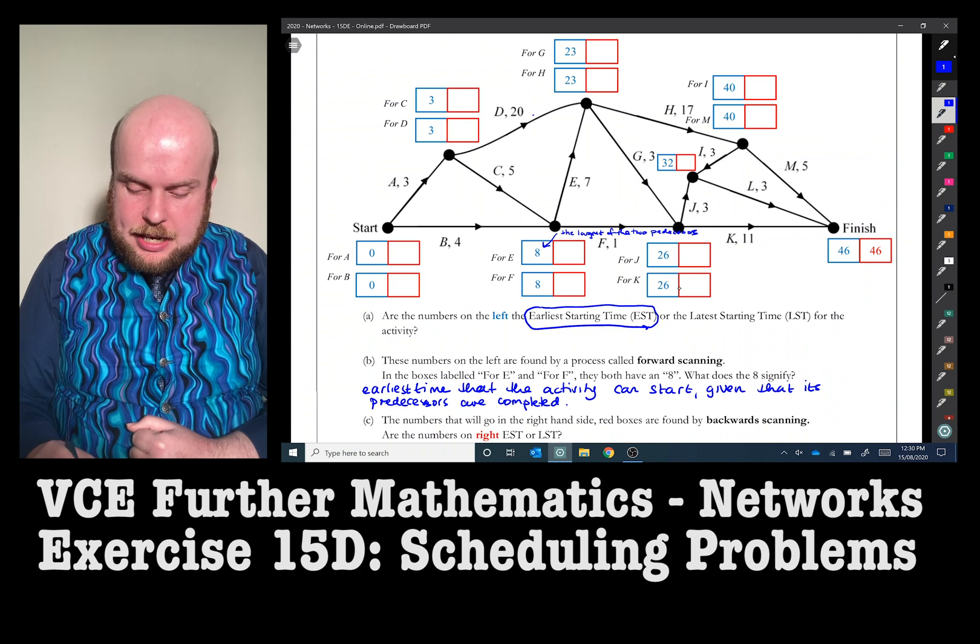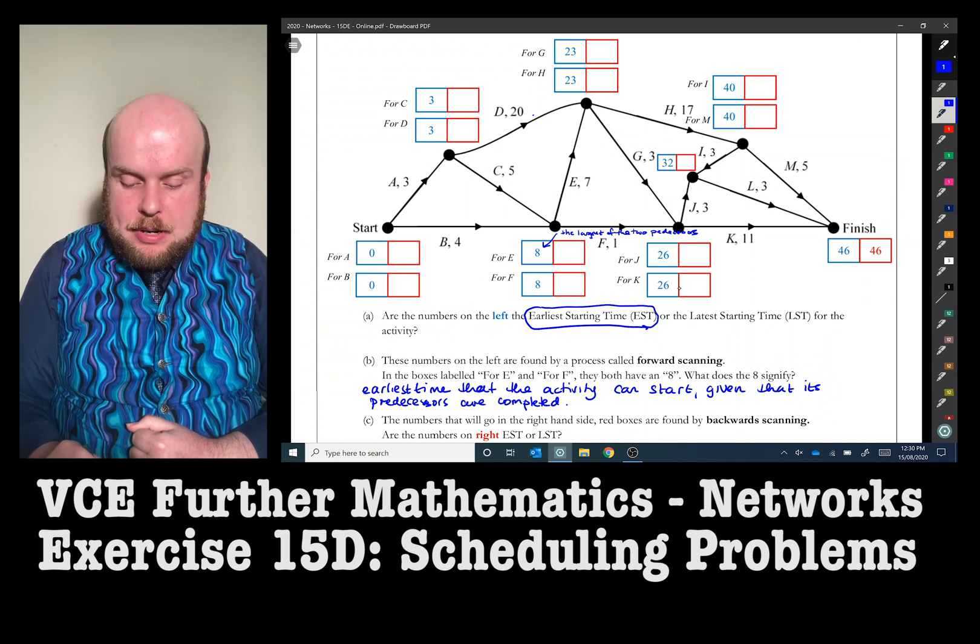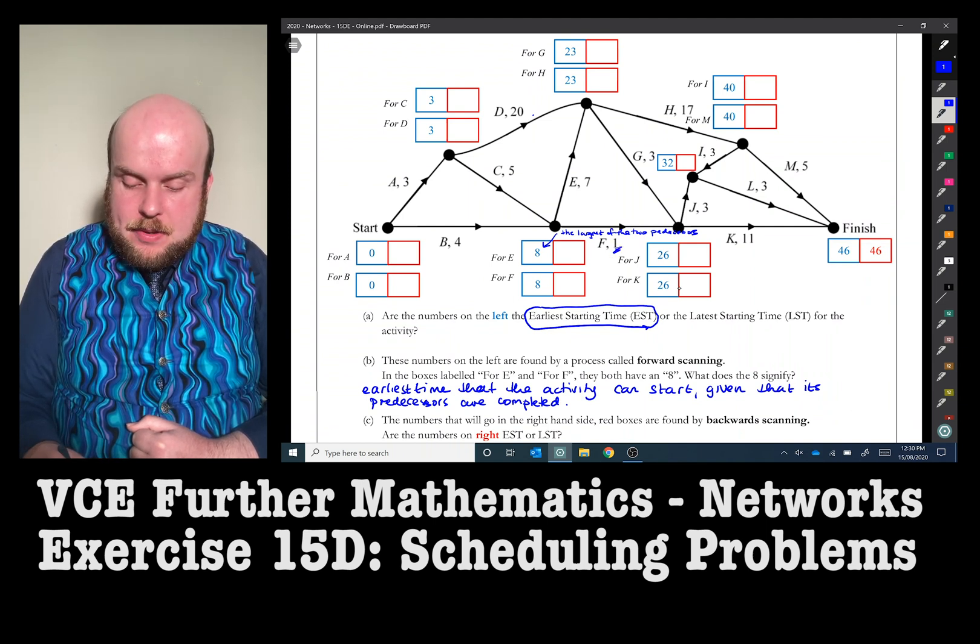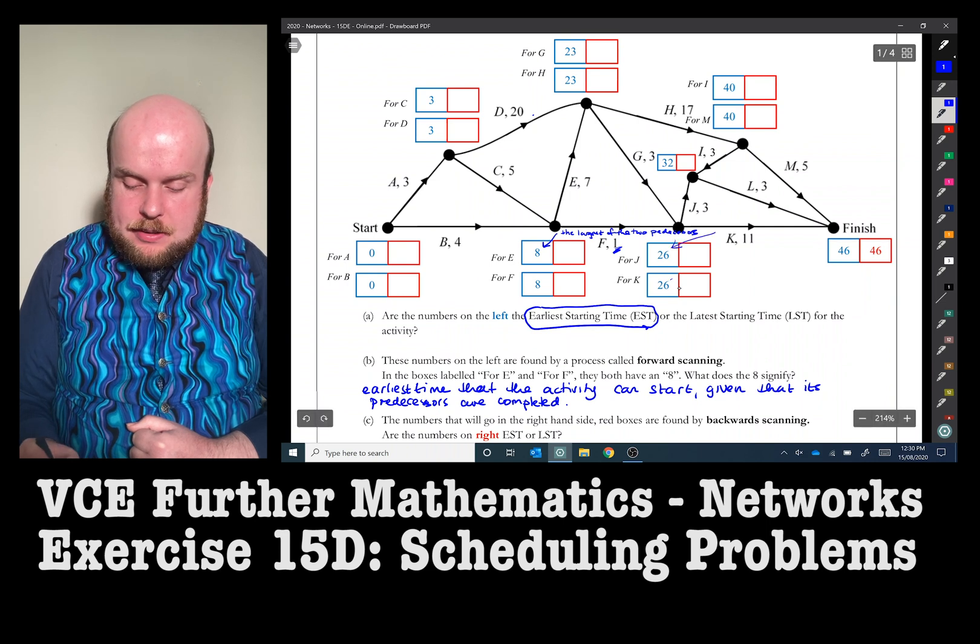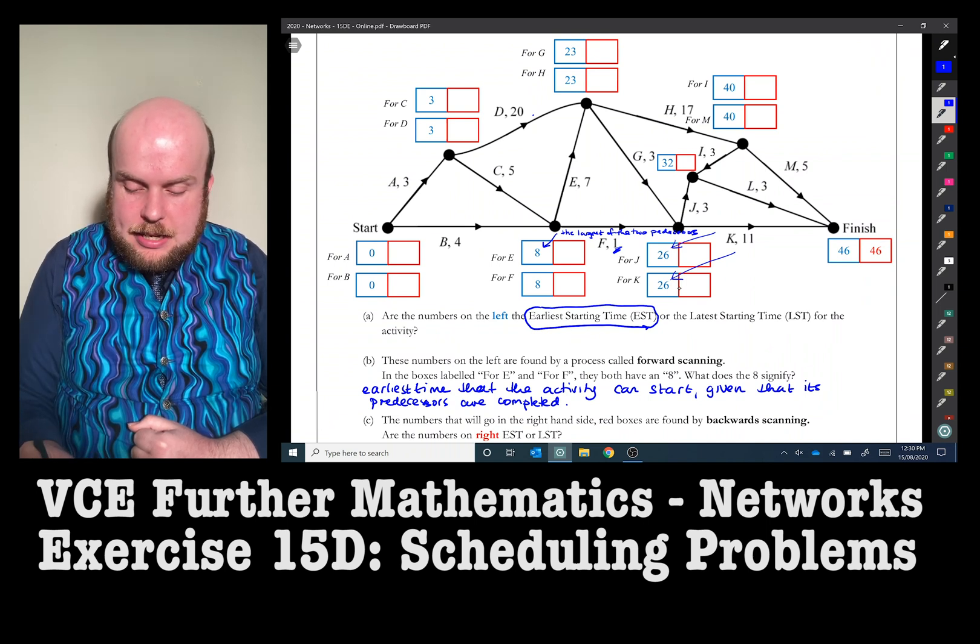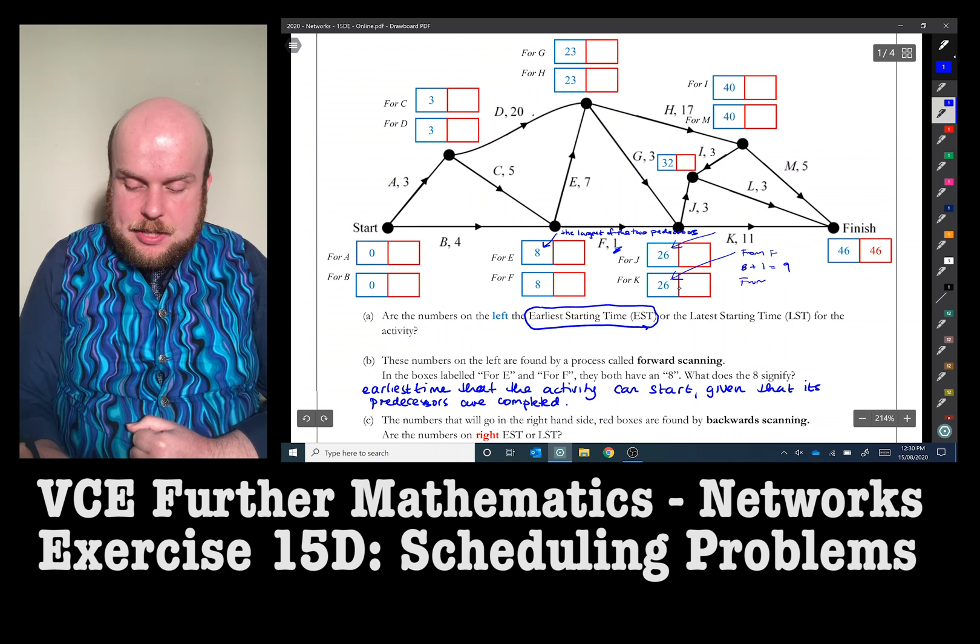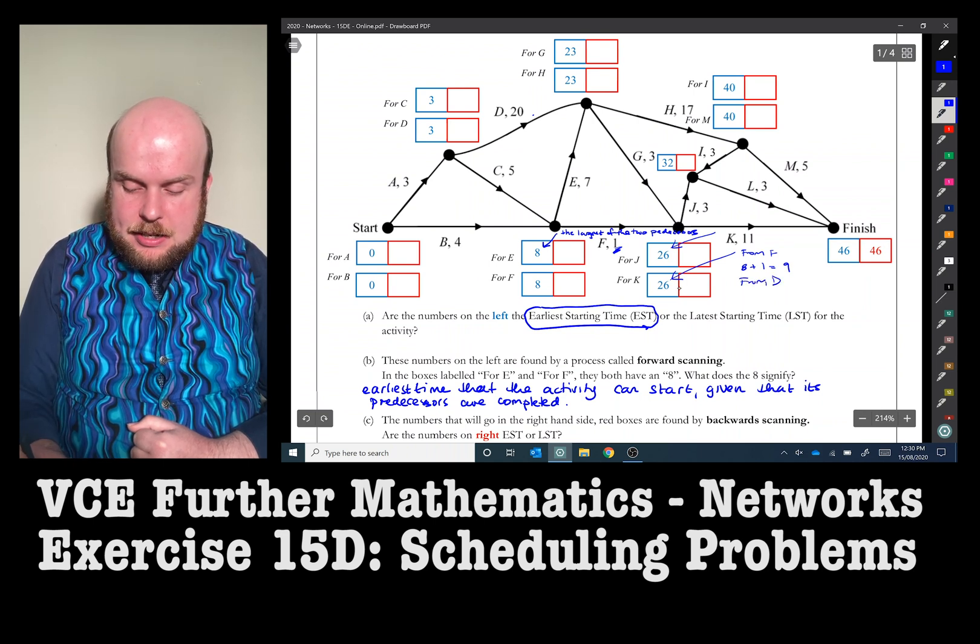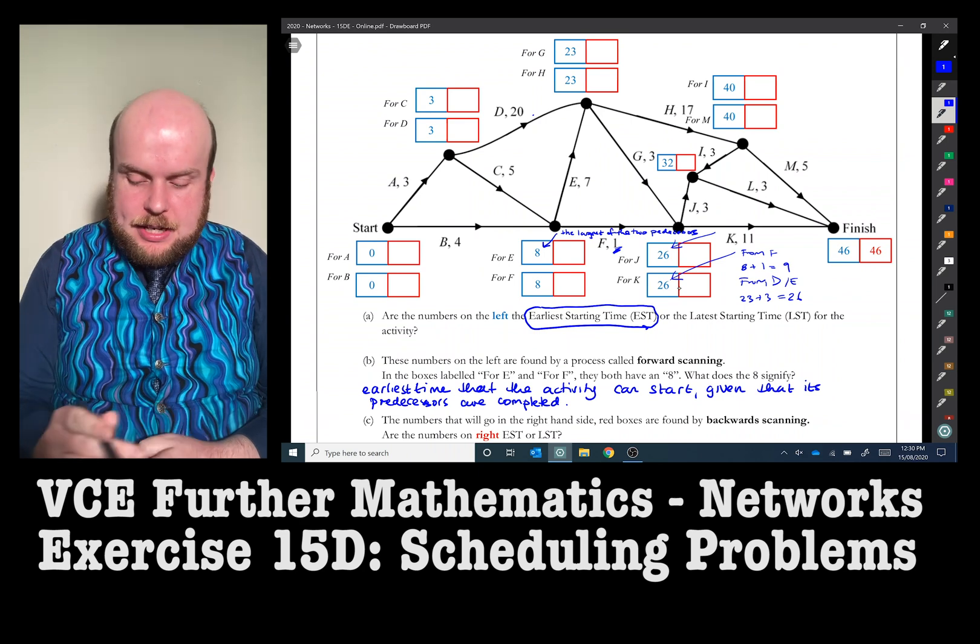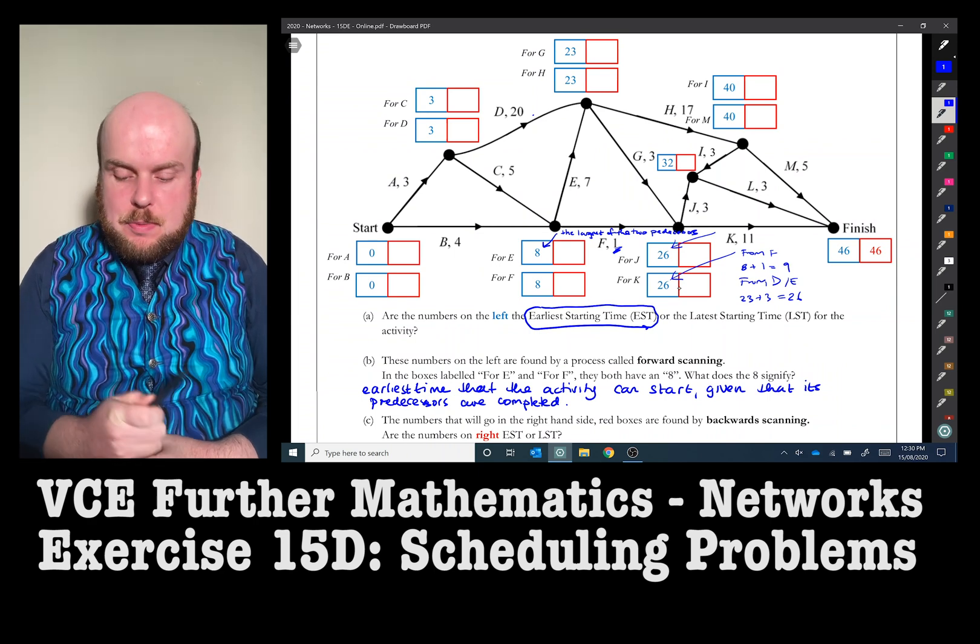And if I look at activity F here, to get that completed, it takes only one hour here. So eight plus one. So here, these two numbers, you'll notice they're all the same number. I can either to get to here, I can either come from F and that would be eight plus one, which is nine or from the other vertex from D slash E, it would be 23 plus three. And of course we pick, it's always dependent on the slowest activity. And the slowest activity of course is being held up at this juncture here. So that's why those numbers have to be 26.